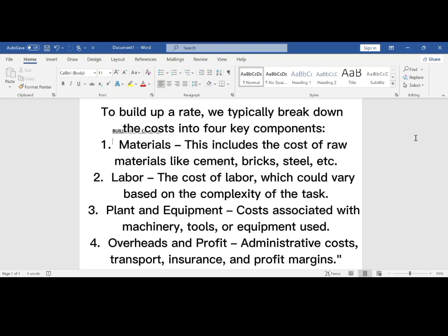The material unit varies. For your cement, it is per bag. Your iron rod, some come in tonnage. The standard for QS is ton, but some also come in length, so you can use it as length.